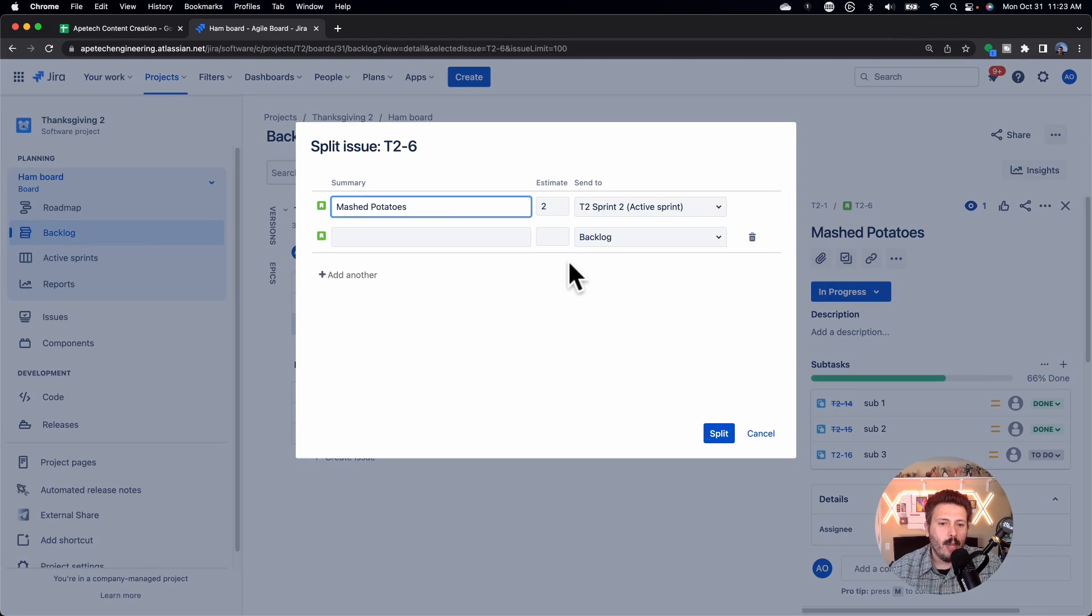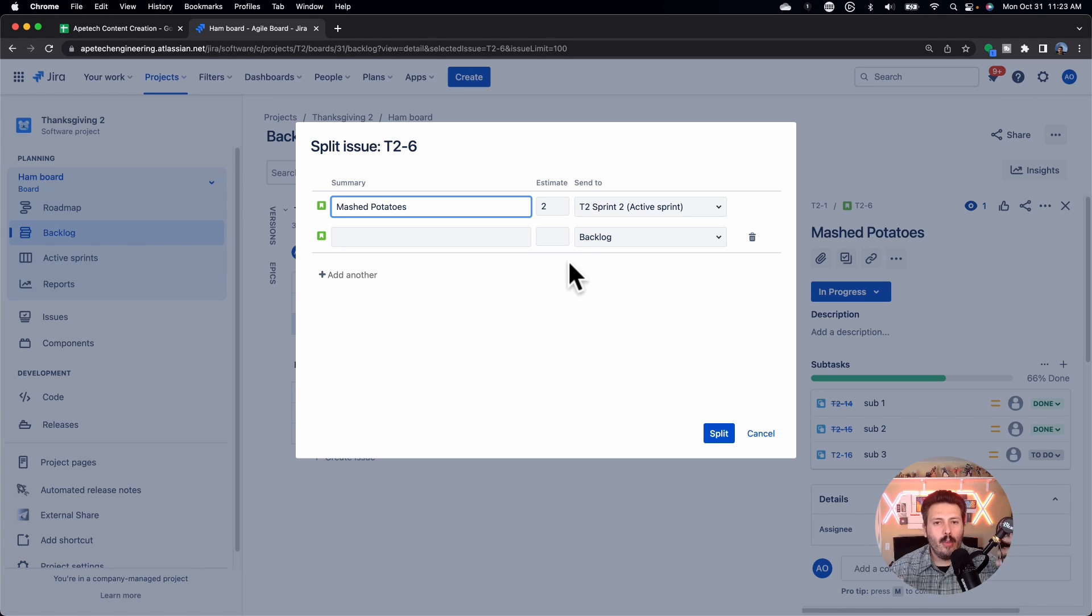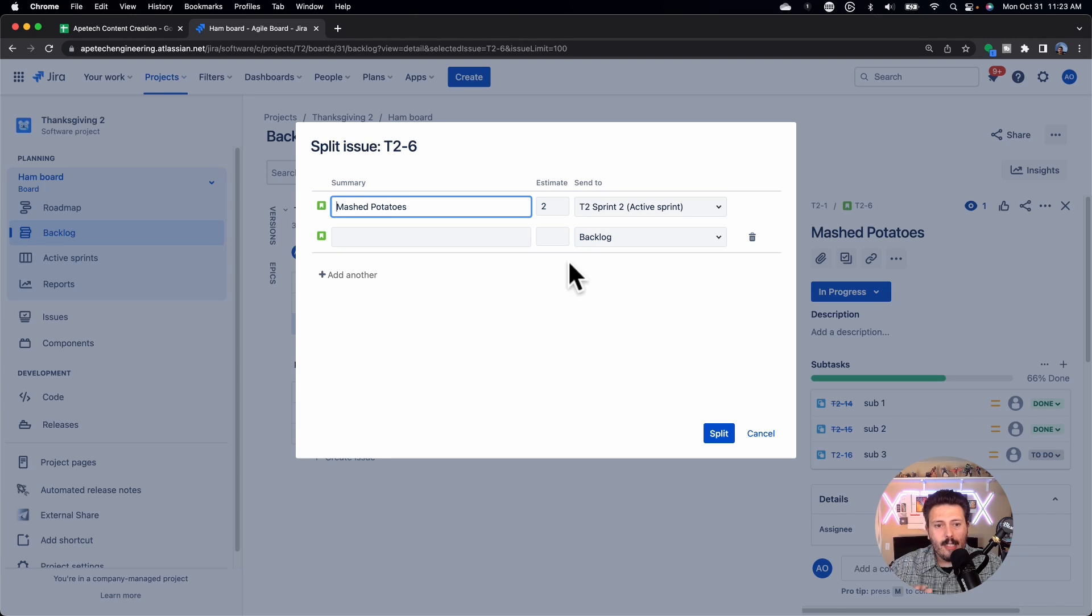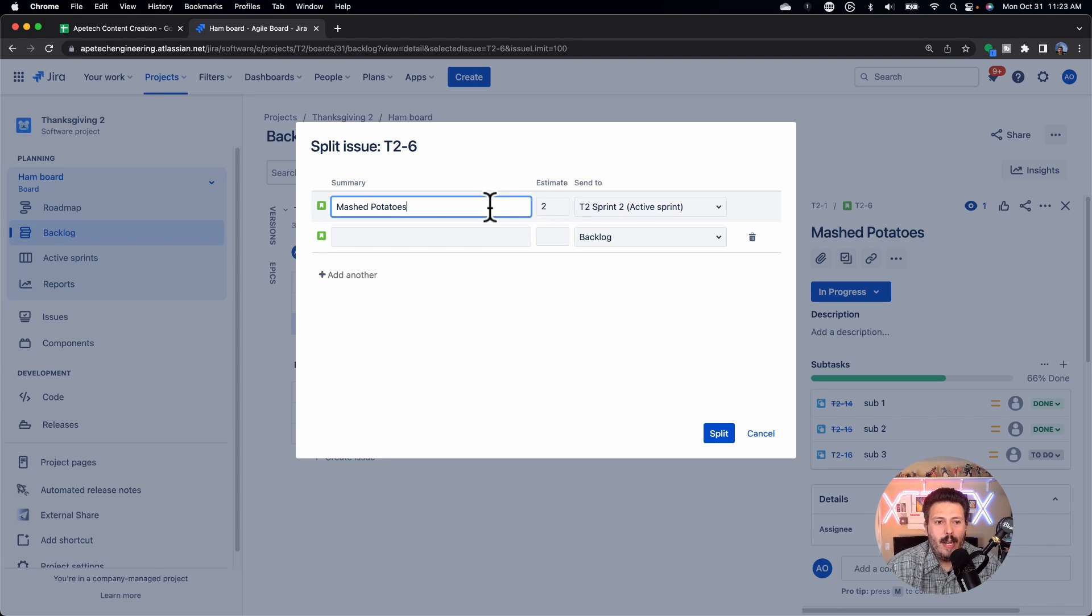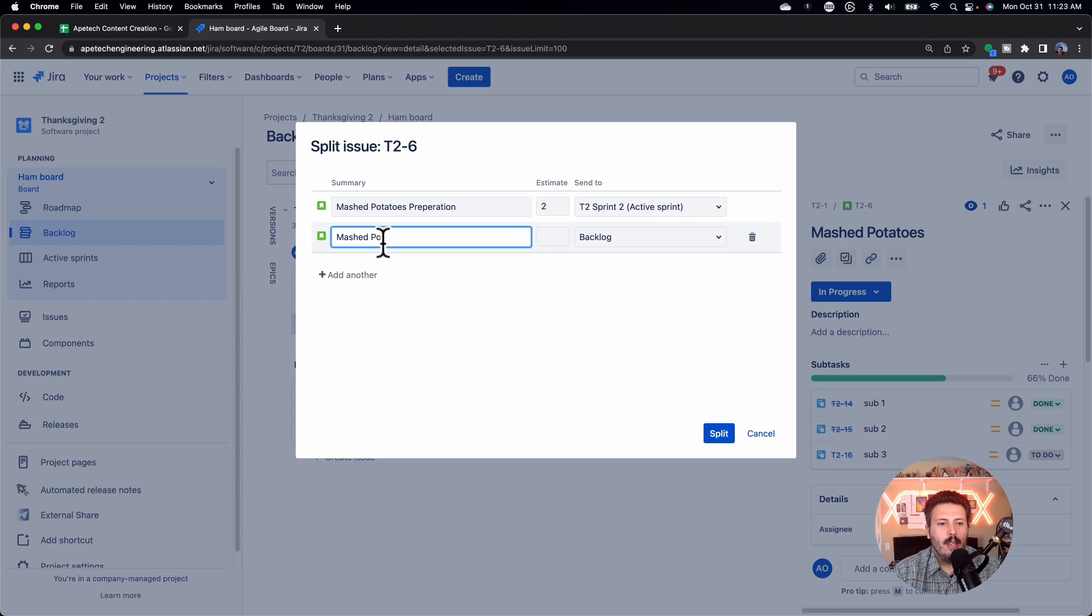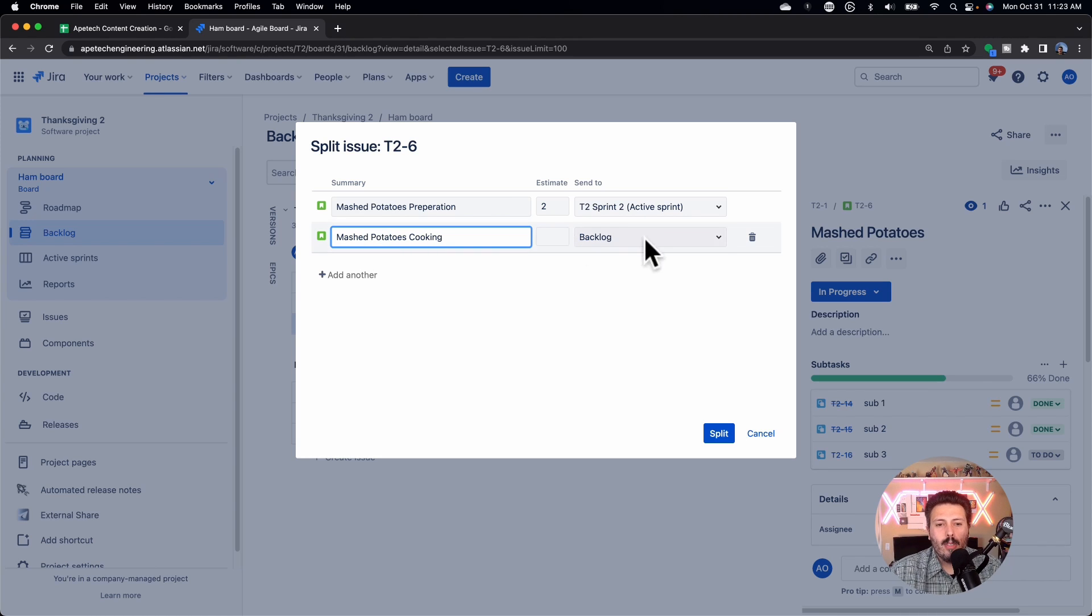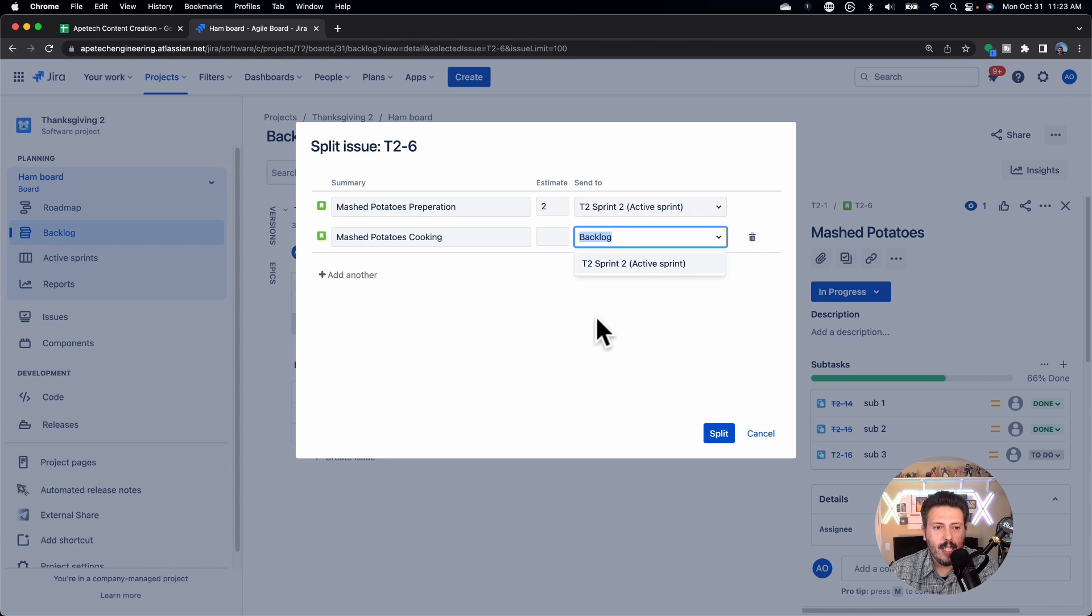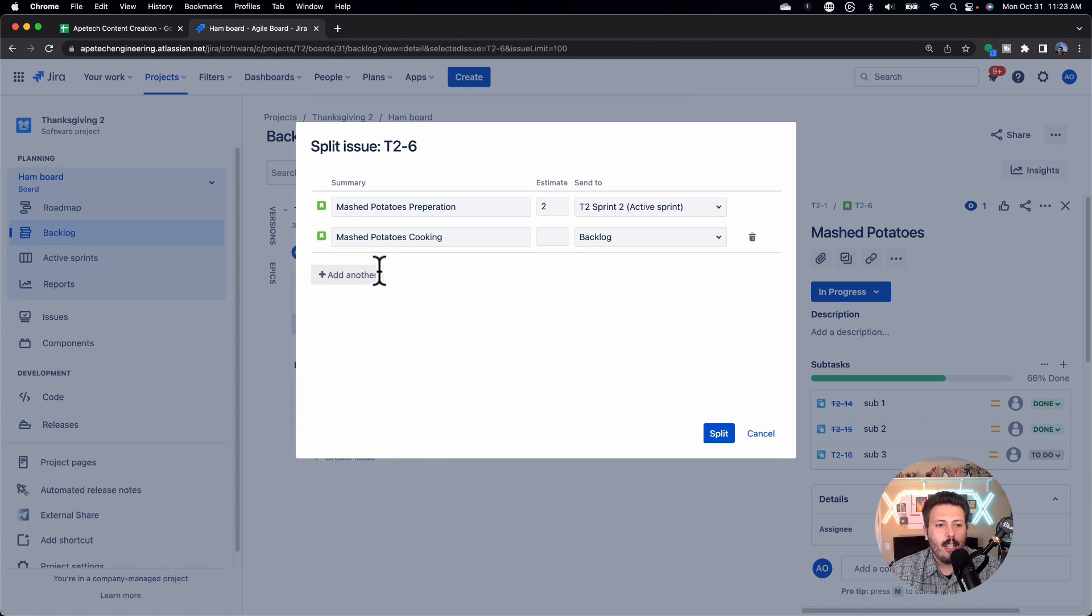And in this window, this is basically where you, I recommend you have your product owner and other stakeholders in the room when you do this, because now this is the window where you go, okay, so what did we finish, right? So maybe we did mashed potatoes preparation, but we didn't do mashed potatoes cooking, right? And so we can send that one to the backlog, we can send it to the next sprint. So if you already have the next sprint available, you can just send it there. If you want to just do the cooking, and then maybe you want to do, you're like, you know what, we should decompose this a little bit more.